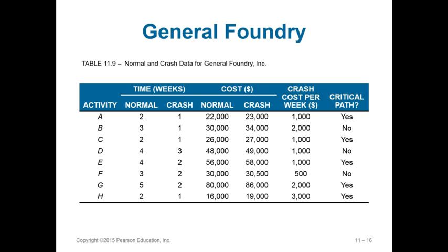And because it's not on the critical path, it does not actually shorten the project time. It's got to be on the A, C, E, G, and H, so one or more of those have to get crashed. So perhaps crashing G from 5 down to 2 would shorten it by 3 weeks, and that would help get you to the 12 weeks.